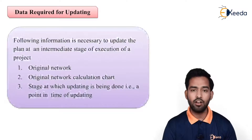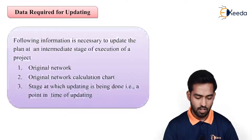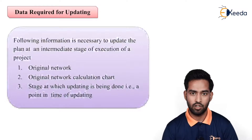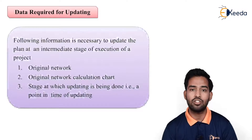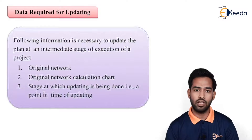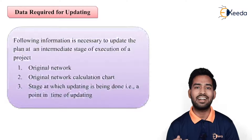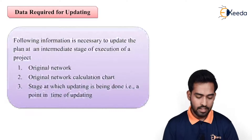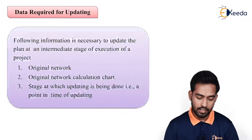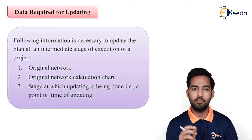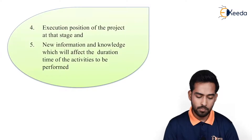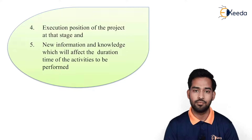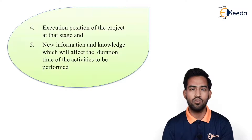What data do we require for updating? If I have to update my network or the project, we require: first, the original network which has been sanctioned before starting the project; then the original network calculation chart, meaning we require all the float calculations, the cost calculations, and the duration of the project critical path. We also need the stage at which updating is being done — that is, the exact point in time of updating — and where we should update it. Then we need the execution position of the project at that stage: at the stage of updating, what is the actual execution position of the project.